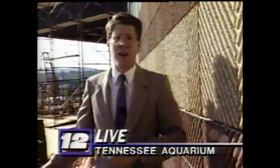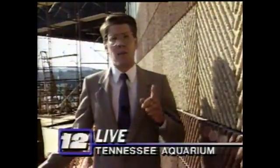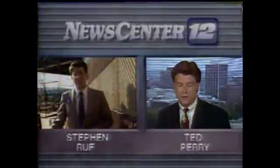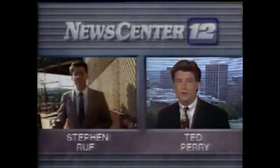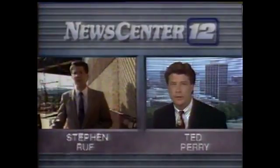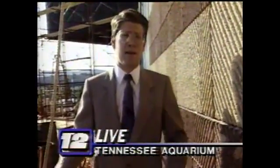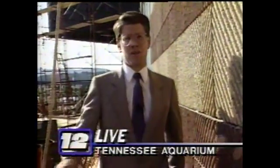You know, the general contractor here, Turner Construction, is very proud of their minority hiring record. More than 1 out of 5 workers here is a minority. We know that we're all shooting for that May 1992 opening date. Will construction be going right until the doors open? Well, they have a deadline of November. The construction people hope to be out of here at that time to give Bill Flynn and his Aquarius about 6 months to get all the exhibits ready.